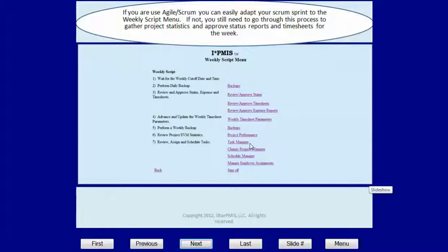If you're at the very beginning of the project, you can use that same process. Load up the task manager with your backlog. Run the scheduler, given your initial parameters, and see what the forecast is. What are you going to do? If it's a large backlog and you're in your initial planning session, you may want to use the milestone manager dialog to break it up into various milestones. You can do that. And obviously we have the charting capabilities to track that.